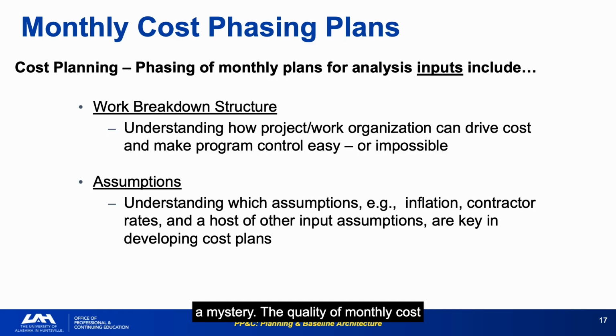The quality of monthly cost phasing plans directly reflects the quality of the planning phase products. Programs that conduct rigorous BOEs, realistic schedules, and careful UFE analysis produce phasing plans that accurately track execution. Programs that didn't will experience persistent, unexplained variances.